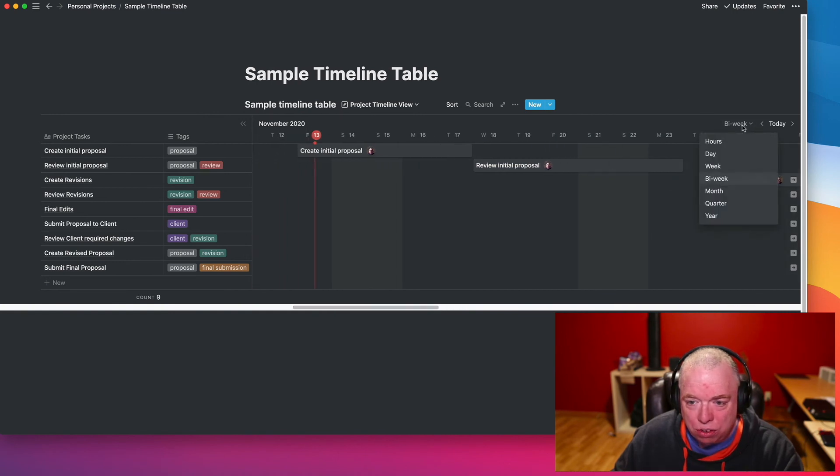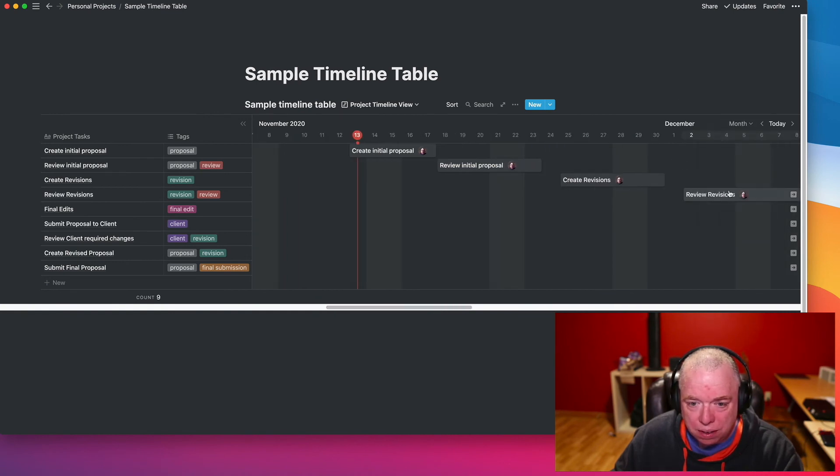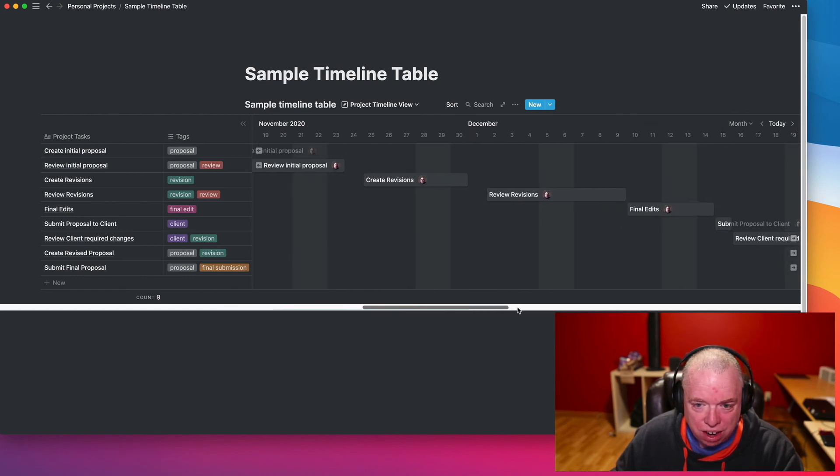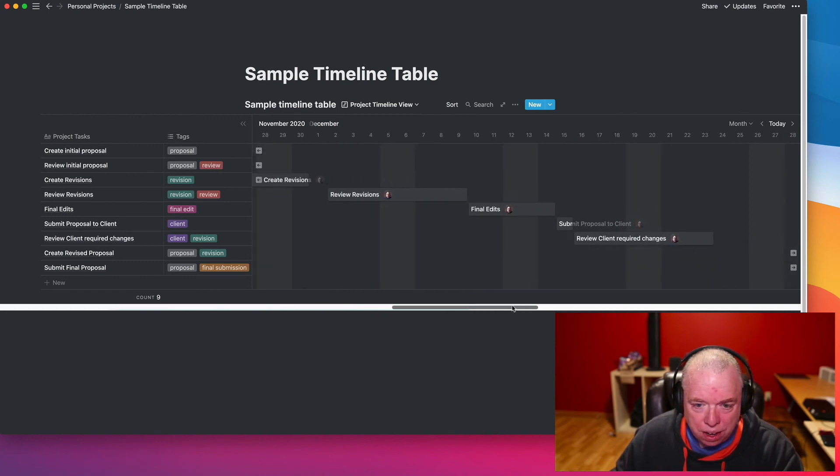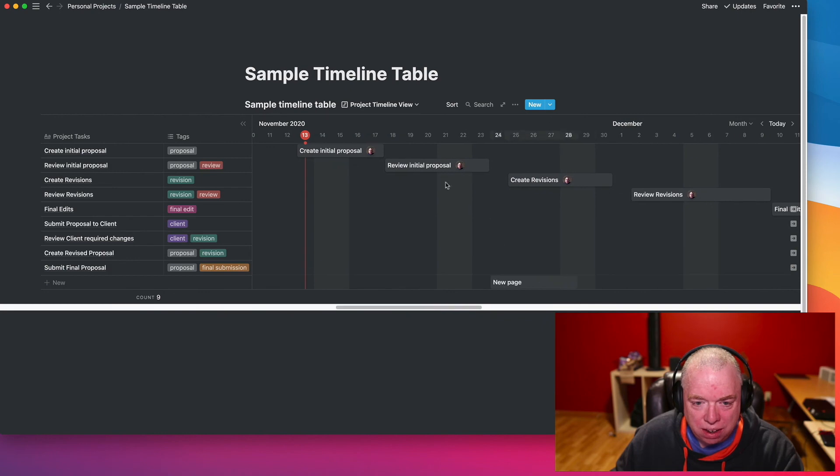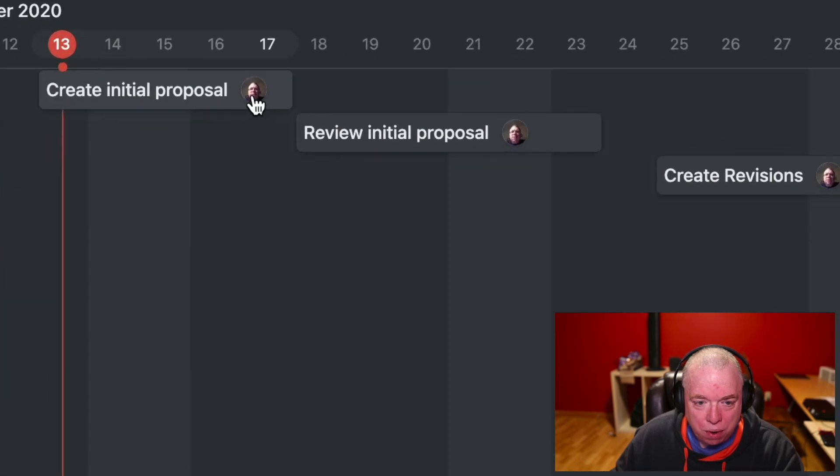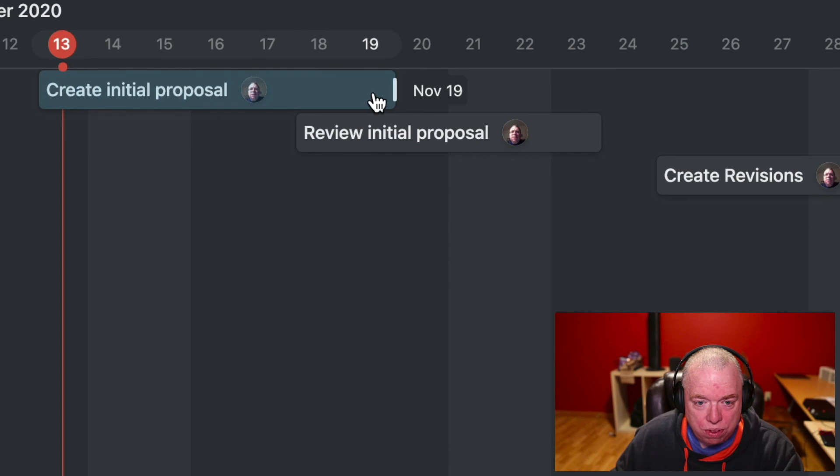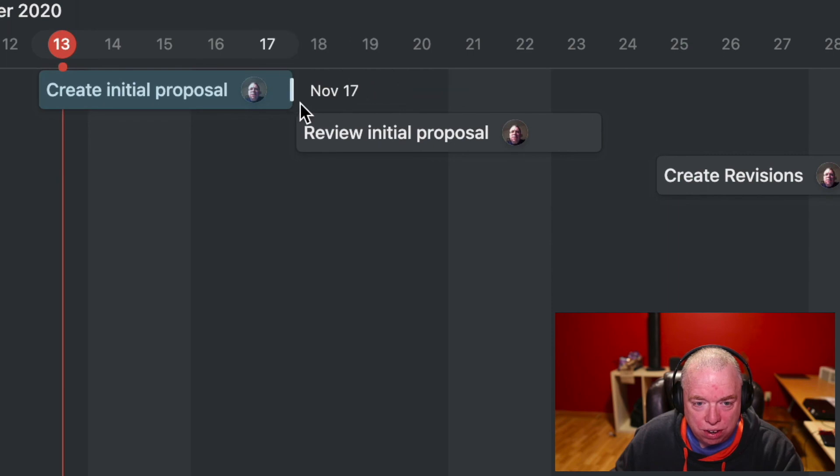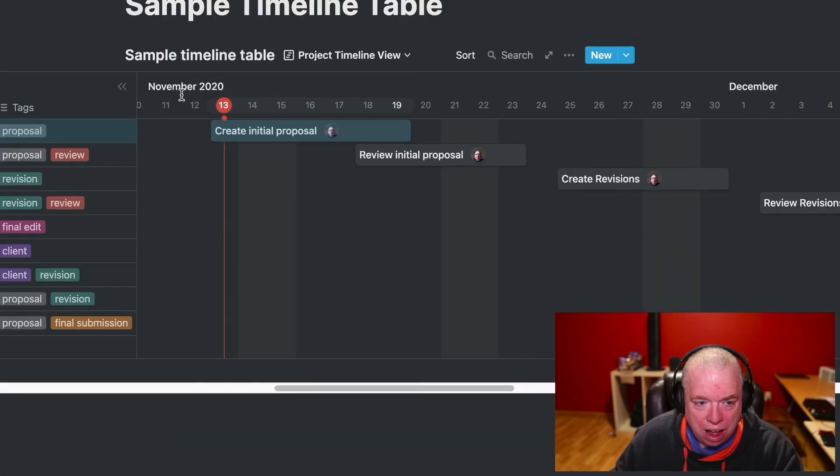And let's change our thing to monthly. And you can see it gets much tighter because the days get tighter. Now, let's say I wanted to change my time. So let's say I wanted my initial proposal, I needed a couple extra days. I can actually move this out by just sliding it. So now, before it was 13th to the 17th, I can make it to the 19th.